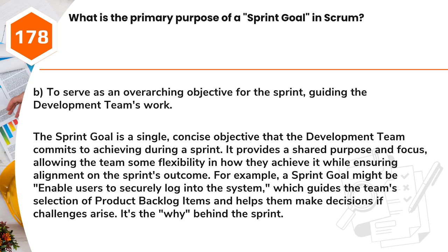on the sprint's outcome. For example, a sprint goal might be, "Enable users to securely log into the system," which guides the team's selection of product backlog items and helps them make decisions if challenges arise. It's the why behind the sprint.